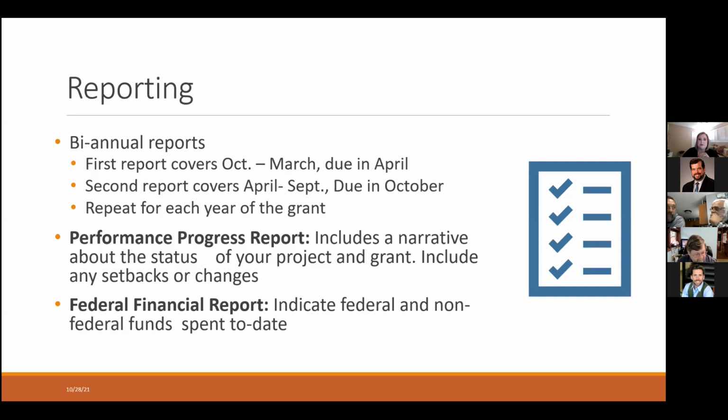So your first one is going to be due in April, and that will cover the period from October until March. And then the next one is going to be due in October, and that will cover the rest of the year from April to September. Those have to be turned in on time in those months. It's not something where you can say, oh, well, I was going to do it, but you have to do it. And you have to do this for each year of the grant. So if you have a 3-year grant, you're going to do this 6 times.